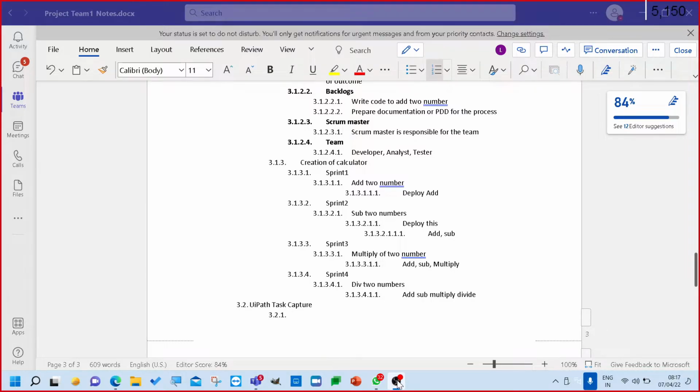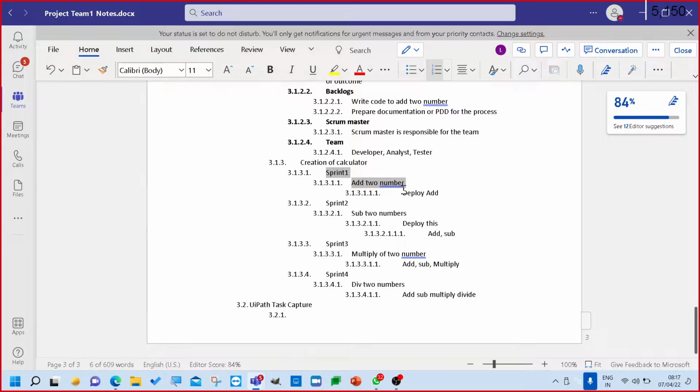Hi Vajrang. In which model can we make changes in the middle of the process? See, if the sprint is already fixed and there is any change, then we can either ask them to wait till the next sprint, or if they are making the changes, we can say that by this sprint one, you cannot have a workable product.